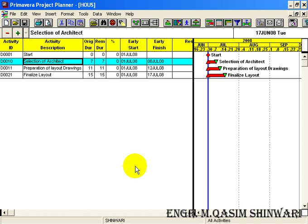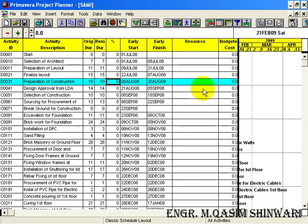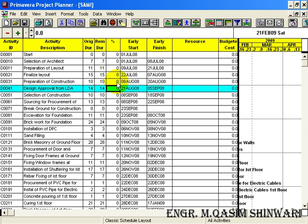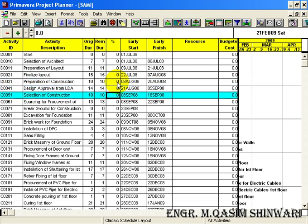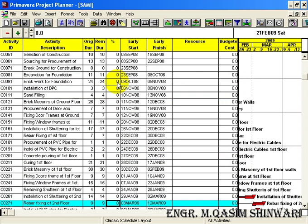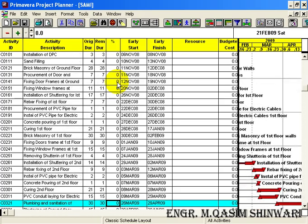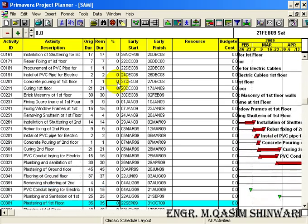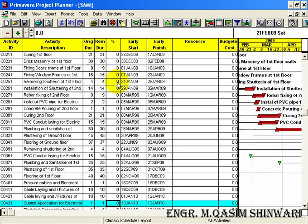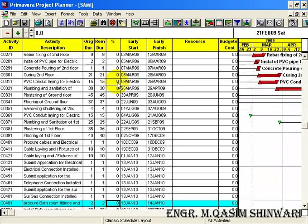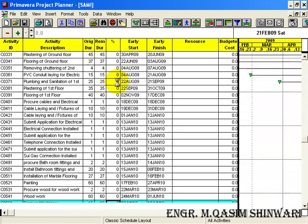Here you can see that I have added all the 62 IDs. The activity ID D stands for design phase, C stands for construction phase.